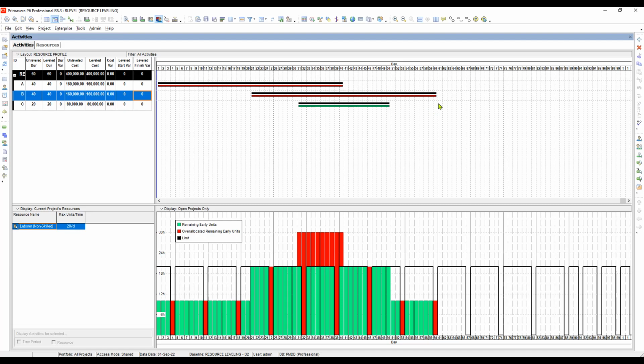Now, if we move it by 10, of course, the start date will also be moving, and it will start from here. So once you move these 10 days here, there will be only 2 competing activities left, right? And from here, down here, it has also two competing activities or concurrent activities that will be accommodated by the resources. So if you look at the bar here, if you move this one, of course, this one will be moving, right?